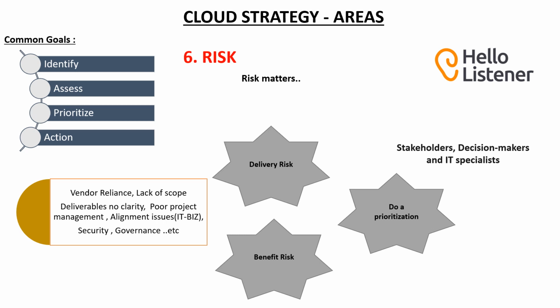And the other risk, what I found, is the risk of not delivering anticipated business benefits which have been defined in our business case. For example, a lack of alignment between business and IT, or technical standards not being followed when you do an architecture, or not having enough security compliance, or you don't even define any criteria to evaluate your business outcomes, right? So after these risks are identified, they have to be prioritized in accordance with their likelihood of occurrence in future. It's a very important aspect, so please take proper note of risk.